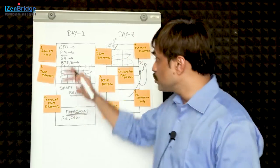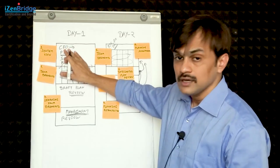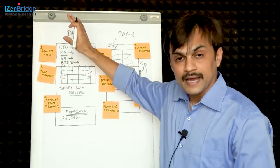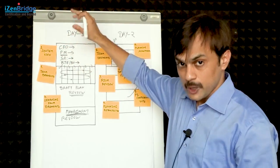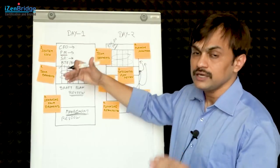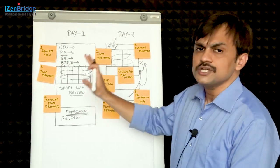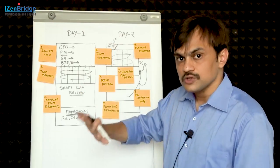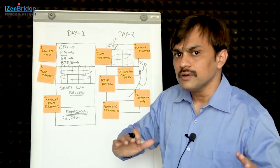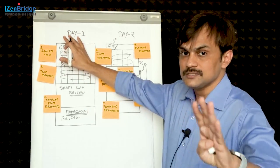If I summarize based on this whole agenda, the input to a PI planning meeting is primarily the refined program backlog items which are prioritized, sized enough, and fit well in a given PI for an Agile release train. That is the primary input. There could be additional input talking about the technological aspect, talking about the current state of our product, and talking about our improvement backlog items. But the primary input is the prioritized program backlog.